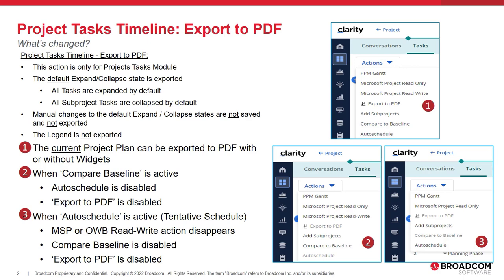The output of the export will use the system default of the Tasks Expand Collapse State. Manual changes on the view to that Expand Collapse State are not saved in a view and thus not exported. If the legend is visible, it is also not exported as it is not saved with a view.